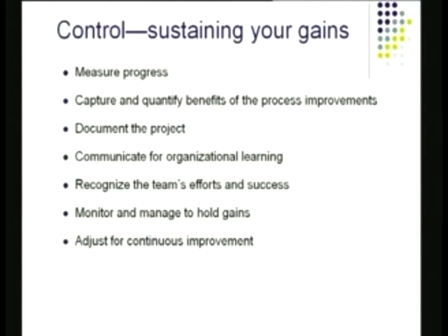Capture and quantify benefits of the process improvements, and document the project. This will provide the motivation for doing more Six Sigma projects. Communicate to the wider organization all the things you've learned, so that other people can learn from this. Recognize the team's effort. You have to make sure you provide incentives for those who worked hard to make sure the success was there.